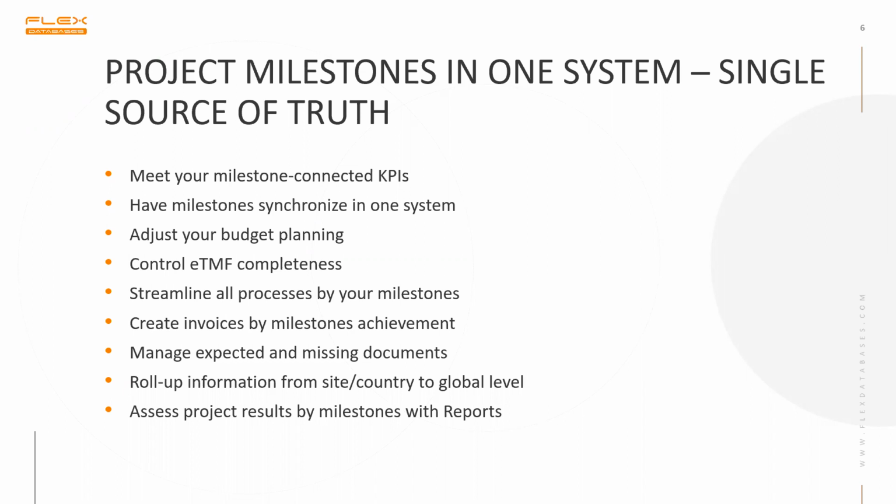On the other hand, to keep the whole team informed properly, the best way here, guys, would be to synchronize the system with the connected vessels. And as soon as one of the team members adds some information into the system, let's just say CRA adds an SQB report into CTMS, in the exact moment, the finance team is aware and sees in their space, project management and budgeting, that this milestone SQB is achieved. And that generates an invoice for the sponsor in case of milestone-based payment.